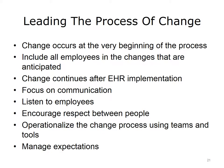Leading the process of change begins with an understanding that change begins well before the actual go-live stage of EHR implementation. In fact, change begins at the earliest stage when the organization is conducting initial assessments of knowledge and attitudes about an EHR. Therefore, all employees need to be included in the change process from the very onset of the EHR selection. A change of this magnitude is a long process; it will not stop with the EHR implementation, but will continue into the post-implementation phase. In planning for change management, it can be helpful to review the culture of the organization during past significant changes, to identify what communication and learning environments have worked and which methods were less successful.